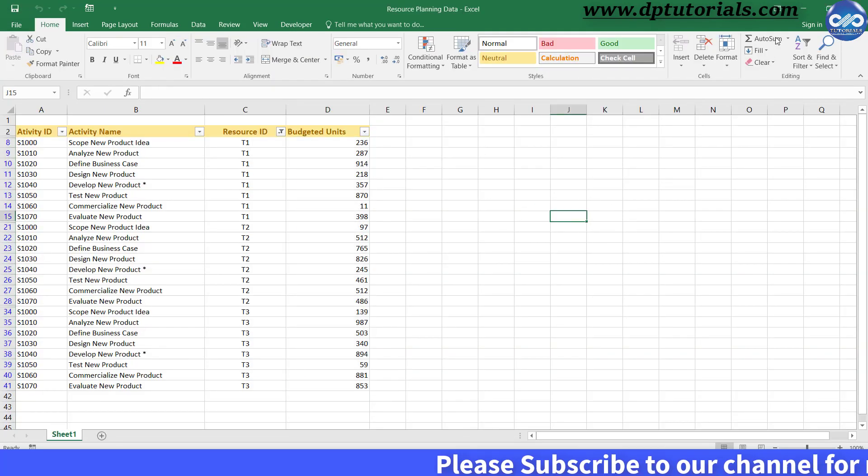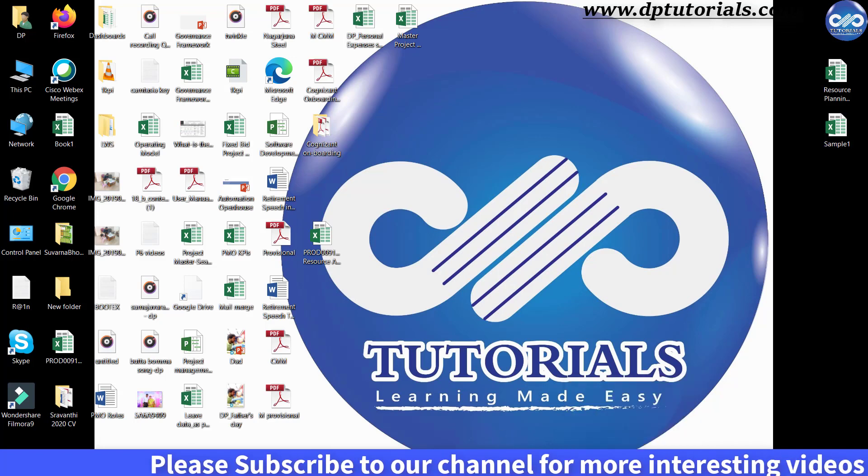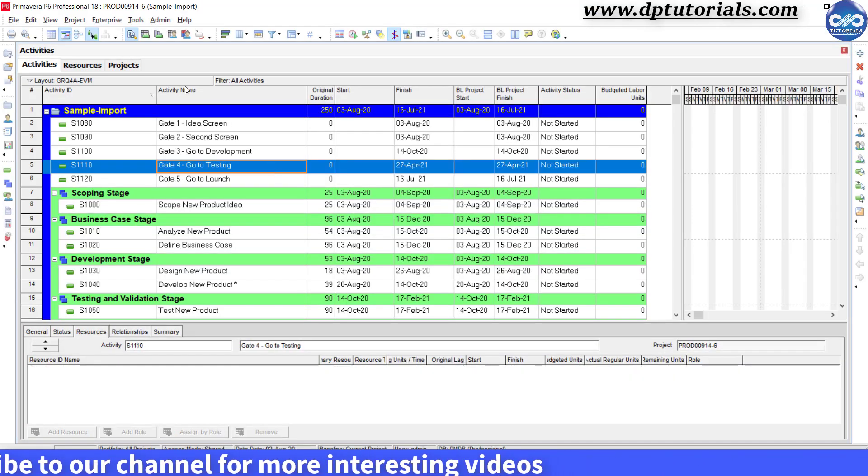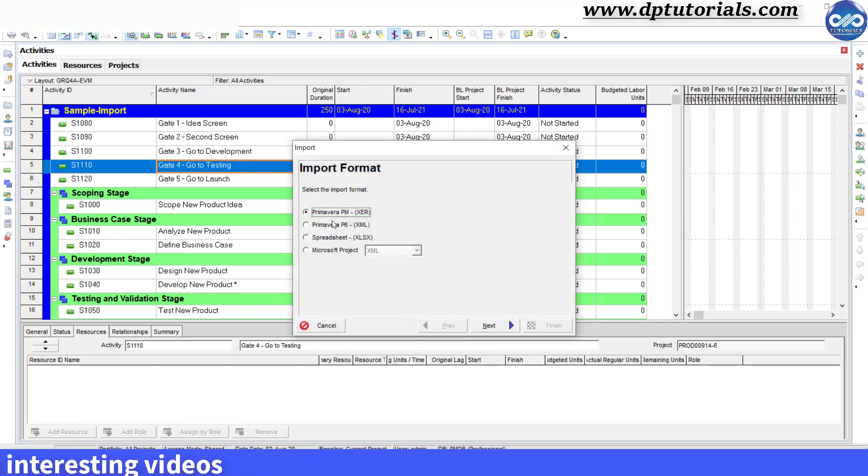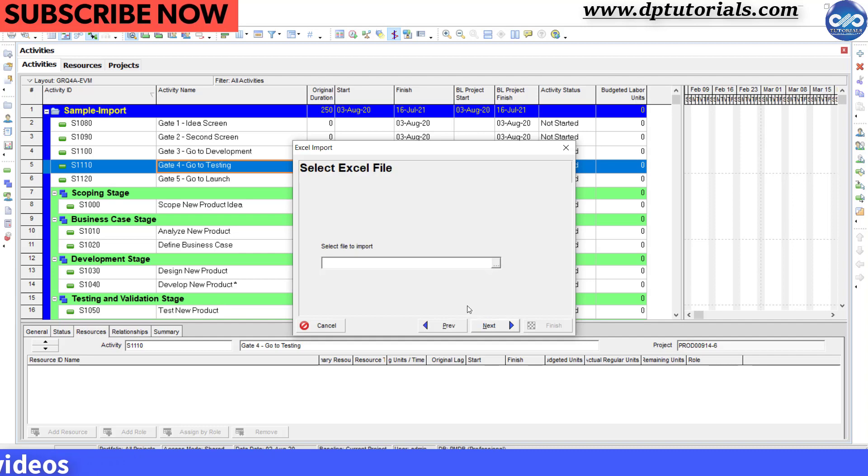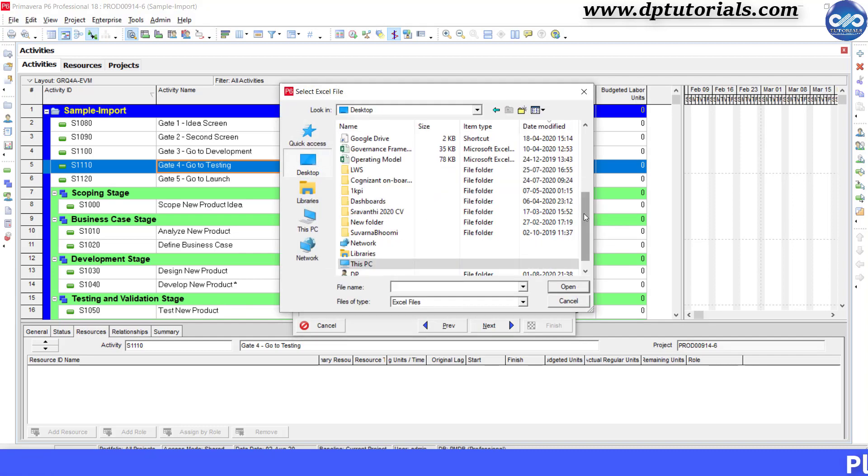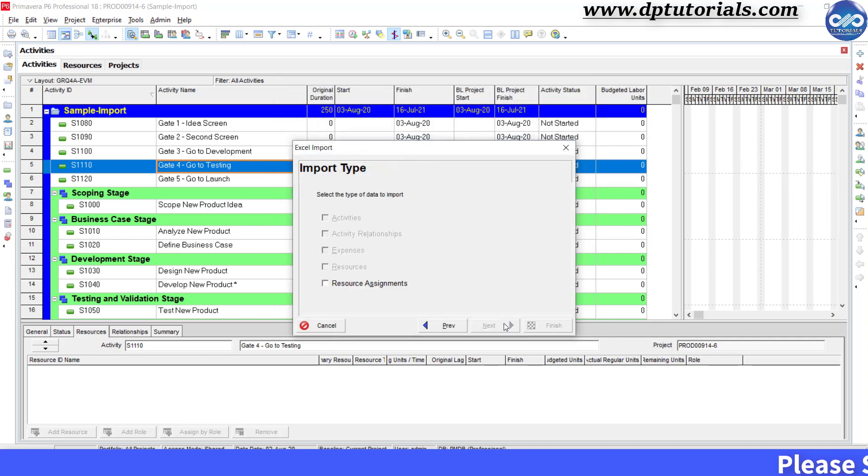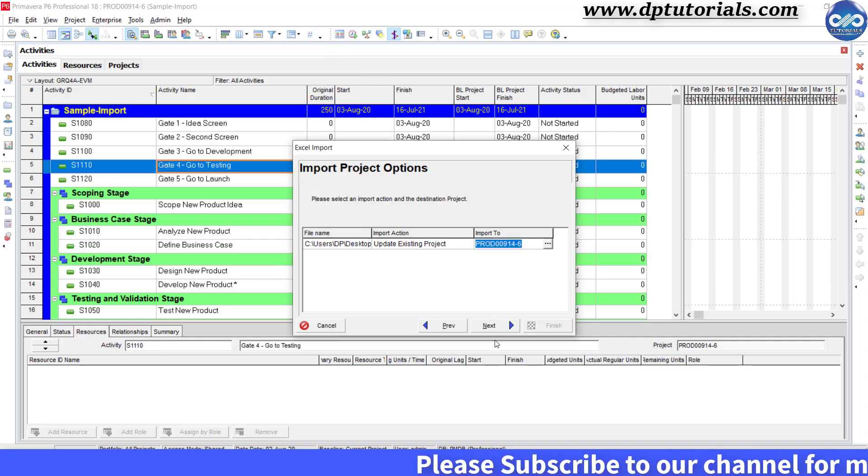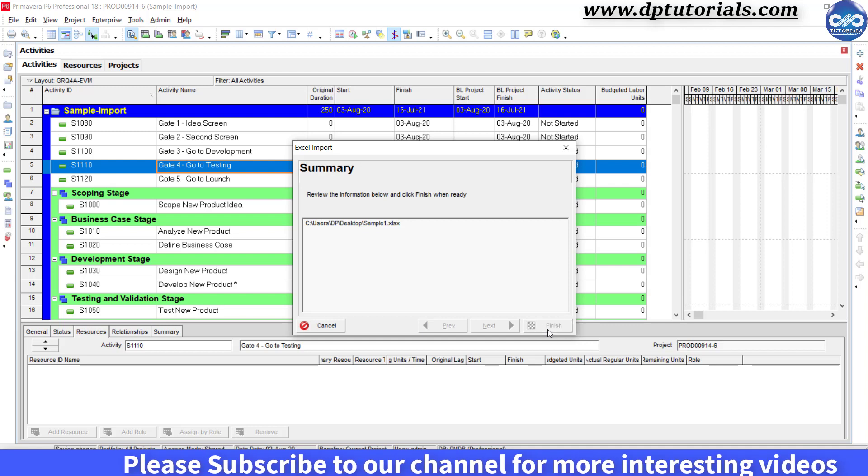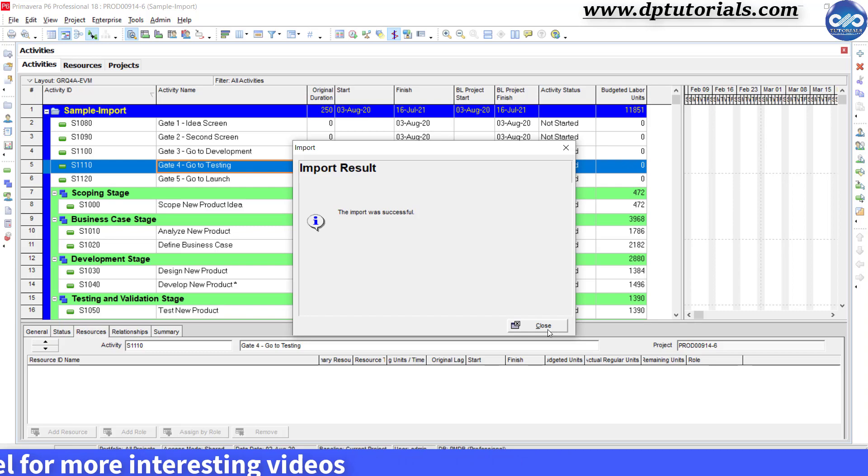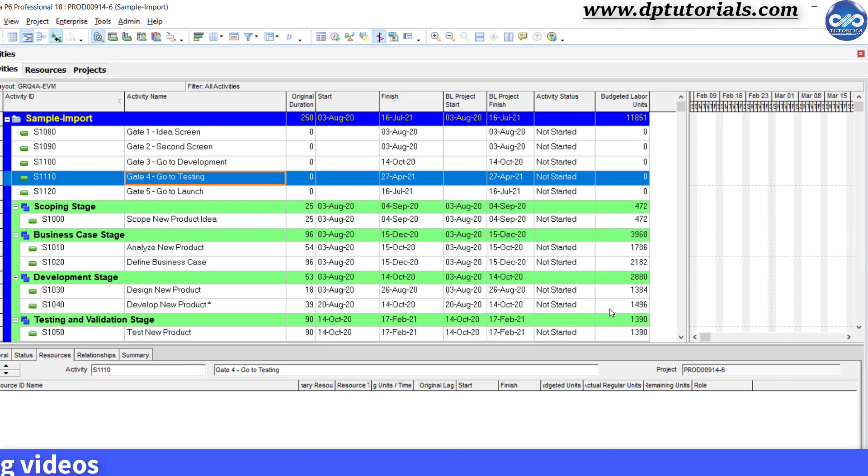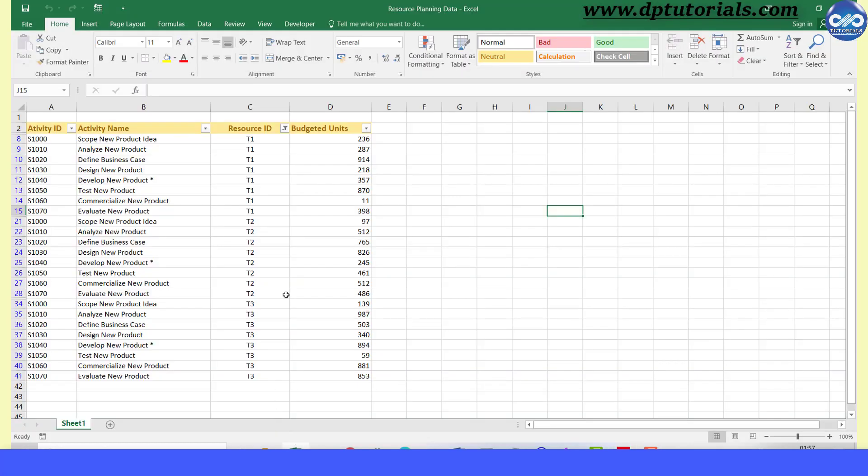Now, go back to the Primavera P6 schedule and let us import the Excel file. Click on Import. Select Spreadsheet option. Click Next. Browse our Excel file from desktop with the Excel name as Sample1. Click Next. In the Import To field, select the XCR file. Click Next. Now, click Finish and you will get the message as import was successful. Click on Close.